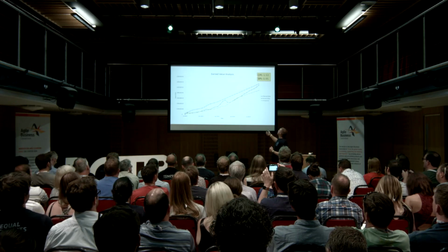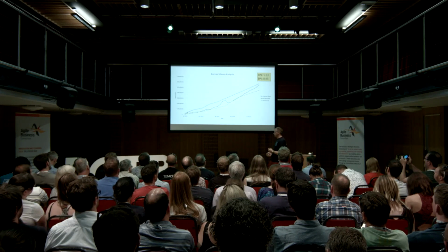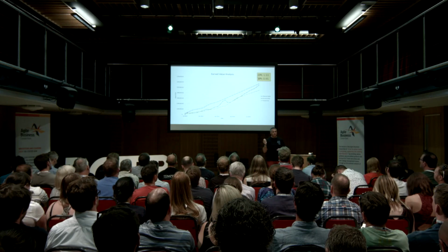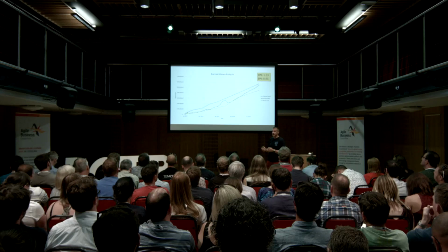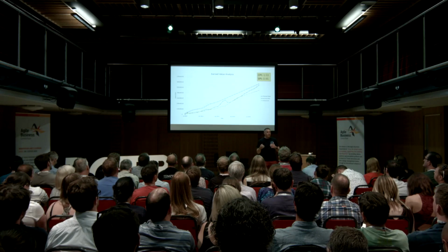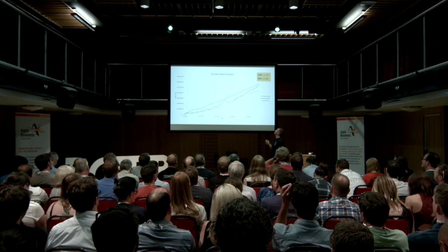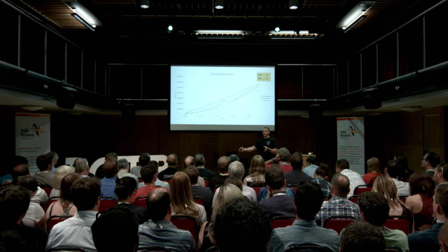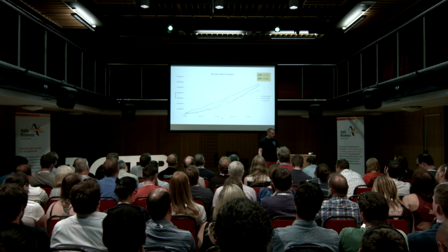Up at this top corner, we've got the CPI and SPI numbers for these last data points. You can see that the CPI is greater than 1, showing that we're tracking under budget at the moment. And our SPI is just under 1, which means we're behind where we wanted to be, but not massively far behind. You can take these numbers for different projects and use them as a comparative measure between the projects to see whether they're on track or not.